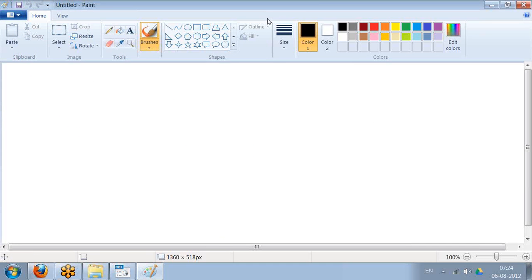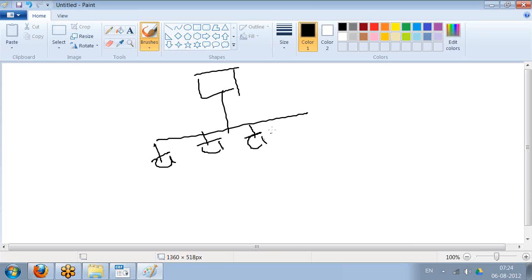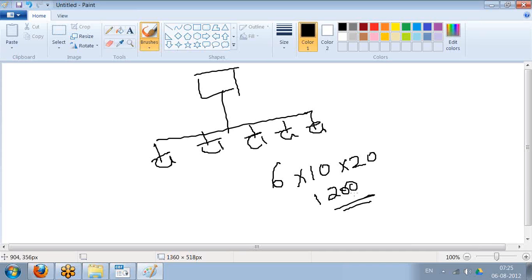If you are in a project, let's say this is a small project, a 6 months project, approximately how many work packages will it have? When I say a 6 months project, there are 10 persons working on it, and per month it is 20 days. So we are talking about 120 into 10, 1,200 work packages. This is a small project. A 10-member team working for 6 months will be around 1,200 work packages.